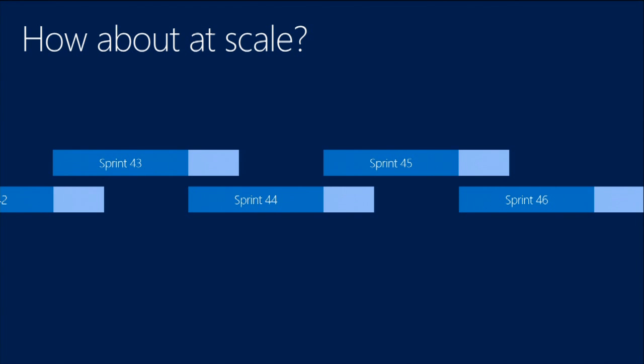Yes? What do you do if you find a bug? You have to fix it. If you find a bug in there, you have two choices. You can roll back the changes, which is a big deal once you put it in there, because we have a cloud release branch, and once it goes in there, it all comes in as one big chunk. And if one team introduced a bug that's going to stop the release, they have to fix it in that branch.